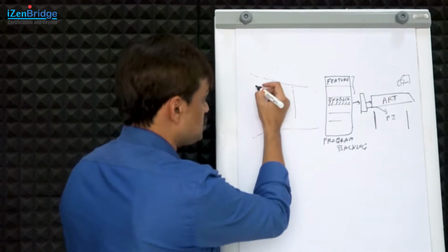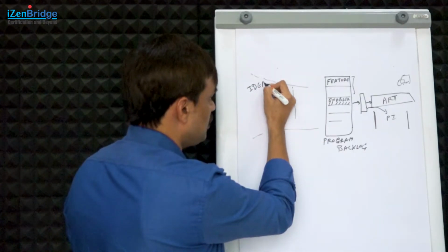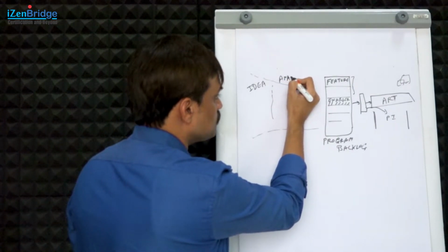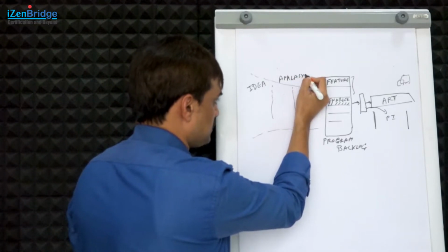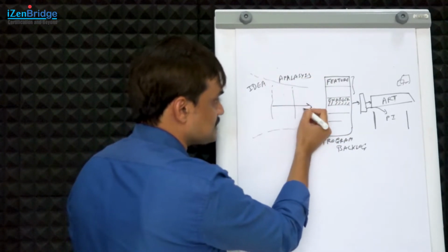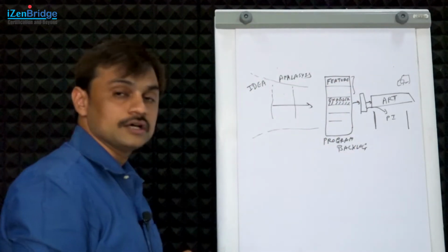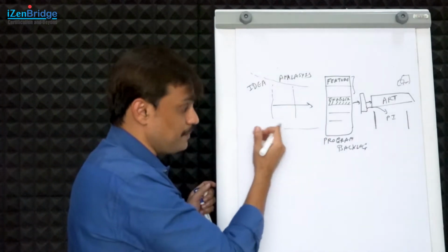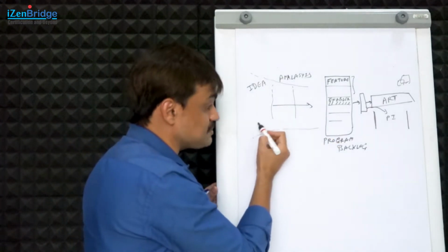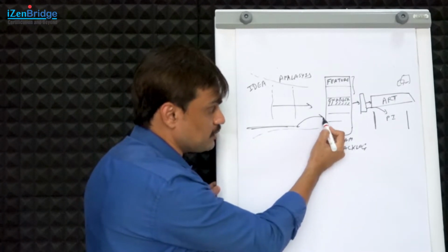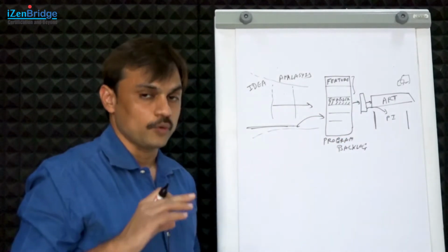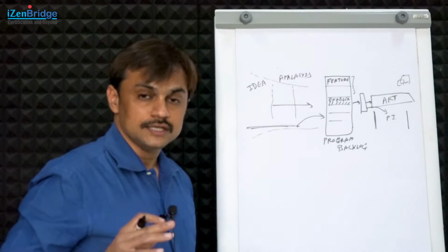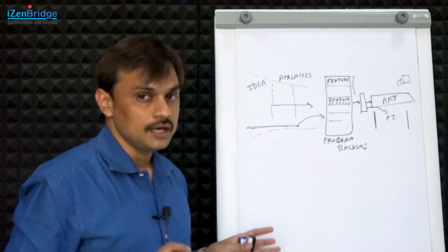You may have a stage which is focusing on ideas. You may have a stage which is focusing on analysis, where you add things, primarily acceptance criteria and other details, for the feature which you are working on. So we will have various stages. We may maintain work in progress limits for this backlog refinement process in order to give just in time ready program backlog items. Again, the product management is the role who is facilitating this whole discovery.